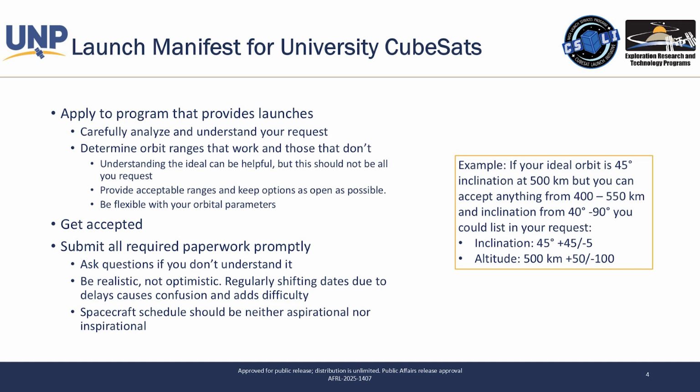And a lot of times delays, they're not due to your fault, right? Sometimes there's supply chain issues. Sometimes there's a part that actually breaks during testing. So we recognize that, but we want to definitely make sure that when you sign up for a launch date, that you have adequate margin in your schedule, that your schedule actually reflects reality, and that it's not sporty or anything like that, but you actually can make it. Recognize too that, when you say that you're going to deliver documentation to support these launches, if you're shifting dates and you're going back and forth, it just adds confusion and it adds difficulty to your launch service and can cause problems with your integrator.